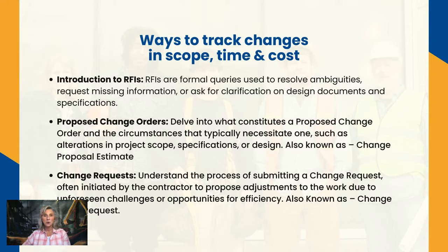That change order can have one proposed change order, or it can have a package of proposed change orders that then are provided in a change order that is submitted to a finance board or a board of supervisors or a school board that are going to then approve those additional costs to the project. Okay. Now that's different than a change request.